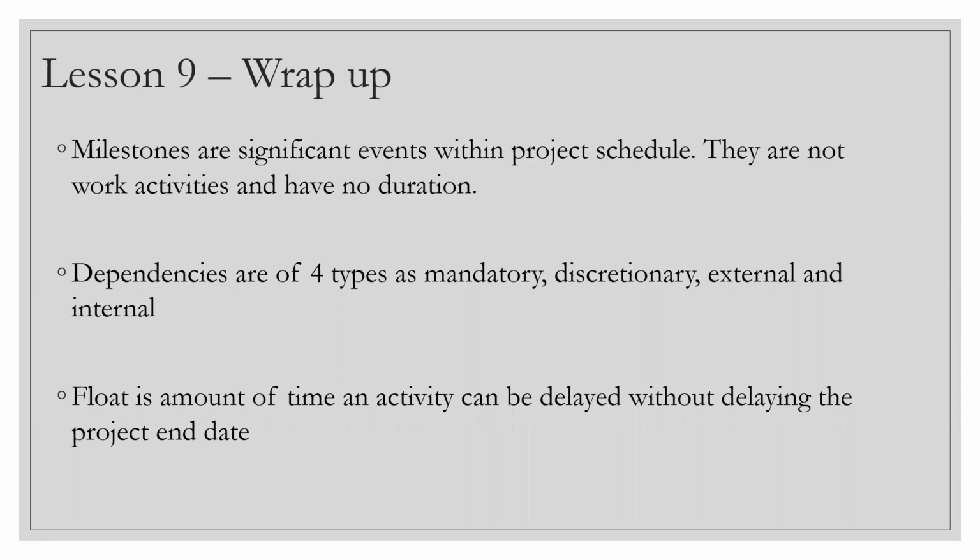Okay, the first thing is milestones. Looking at the activity list and the network diagrams, many people will say, okay, that is milestone 1, once you complete activity 1 and 2. Correct, fine. In a normal infrastructure project, there are 5 to 6 standard milestones: first is define, then design, third is order hardware, fourth is the implementation stage, fifth is testing, and sixth is go live. Most day one projects go through this flow.